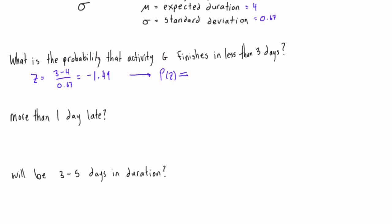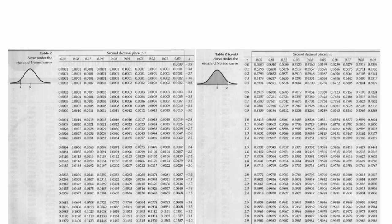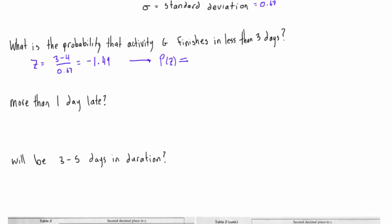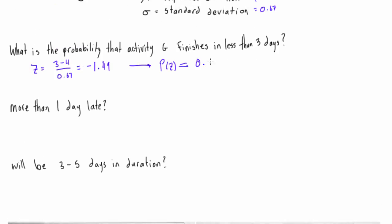We're looking for the probability of the z-score for negative 1.49. We find negative 1.4 and then 0.09 — combining those gives us negative 1.49, which is the z-score we have. We see where these meet up and the probability given is 0.0681.